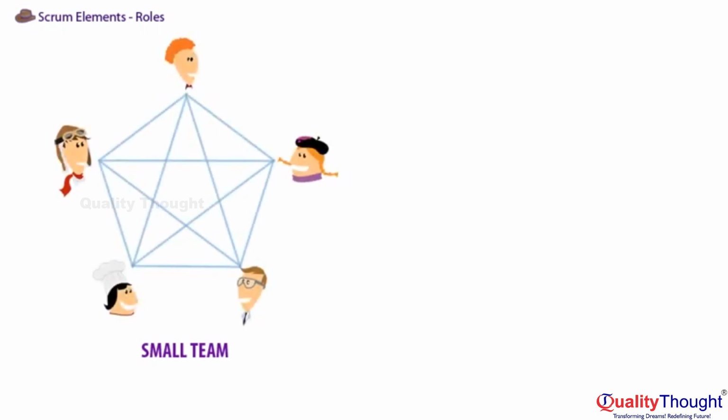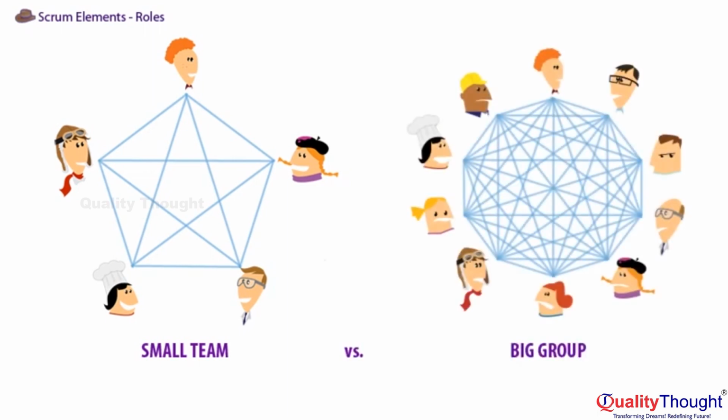The Scrum Development Team is a small group, no more than 9 people. We have millions of years of practice dealing with groups about the size of a family. Large groups don't self-organize effectively until they divide into smaller teams. In large-scale Scrum, full-stack feature teams pull their work from one product backlog and integrate their work every sprint.